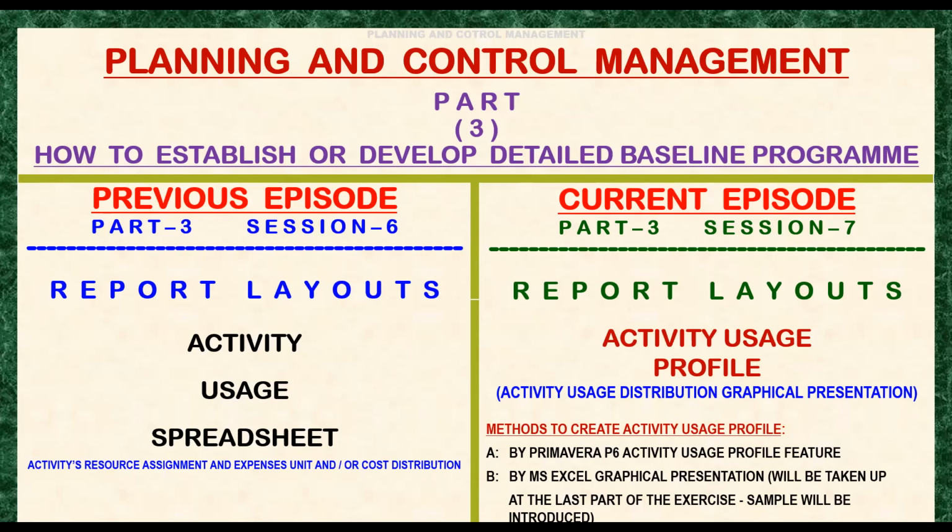Okay, moving forward, let's proceed. Before that, speaking of distribution curves, we can select predefined resource or cost distribution curves within Primavera P6 itself and assign them to each resource to specify how resource units or cost spread over the duration of an activity.